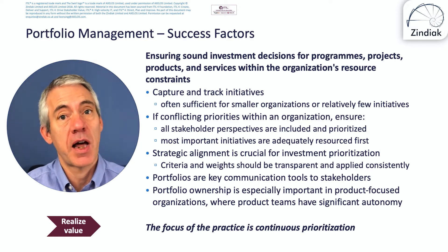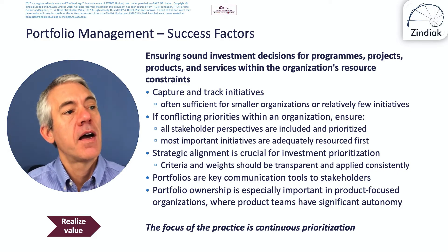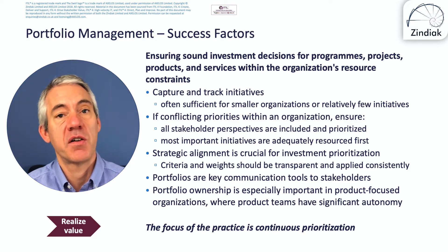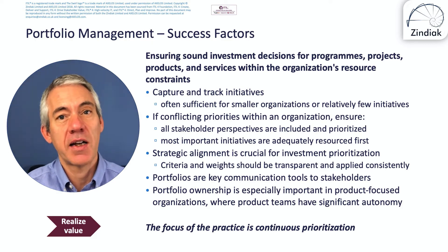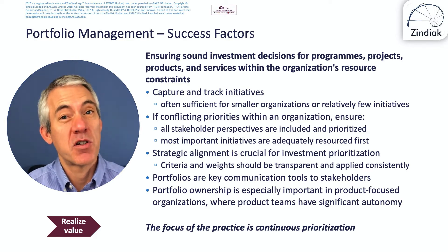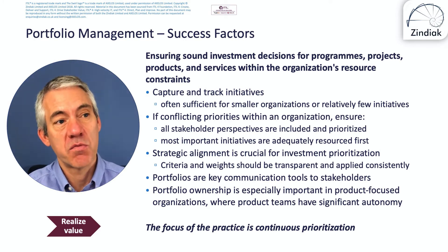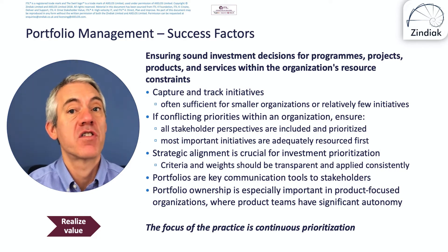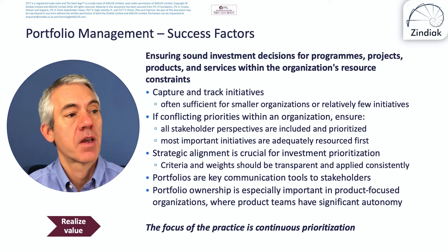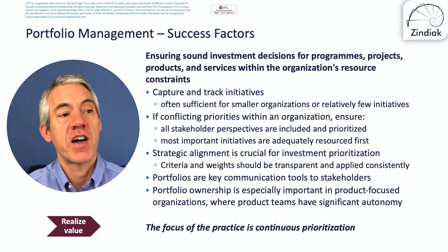Where there are conflicting priorities within an organization, ensure that all stakeholder perspectives are included and prioritized, and that the most important initiatives are adequately resourced first. That's very much in line with agile delivery — having a product backlog and prioritizing using MoSCoW. The must-haves are our most important initiatives, and we prioritize and resource those first, then ask what should-haves and could-haves we can also do.